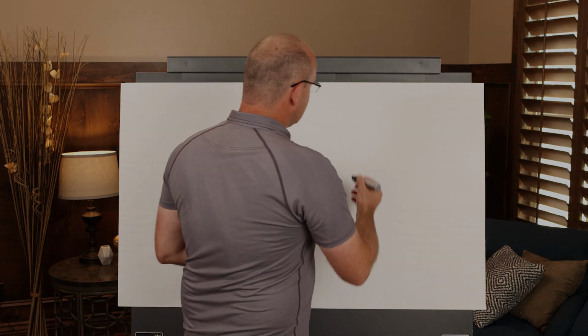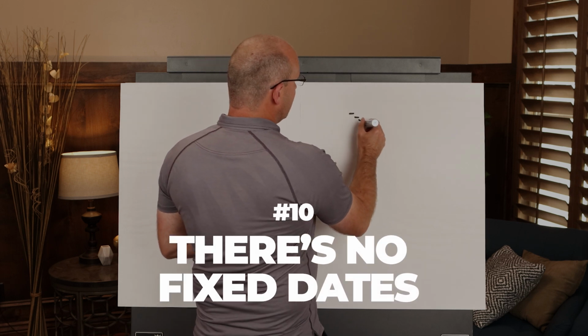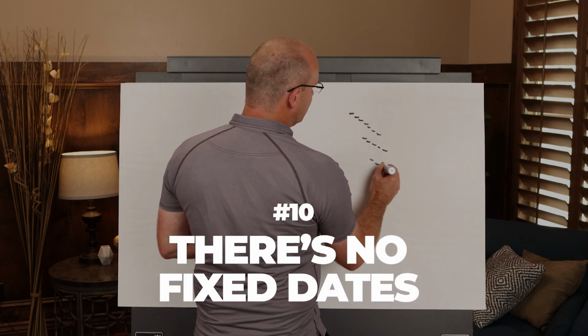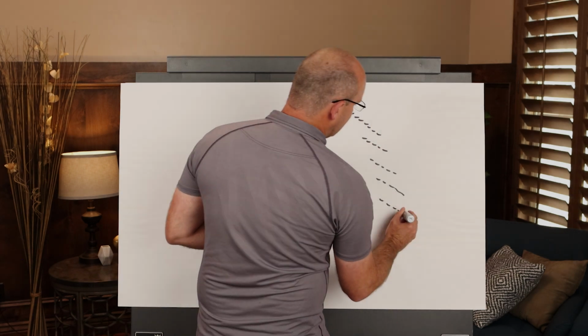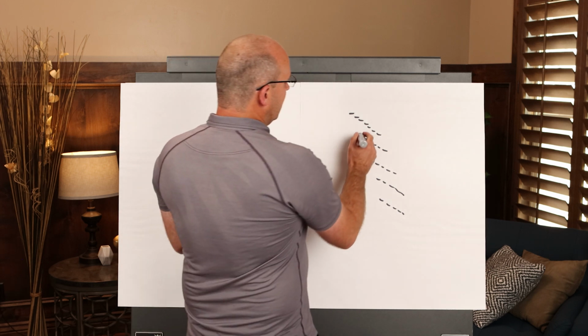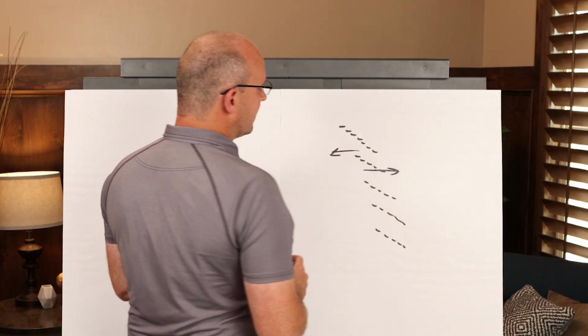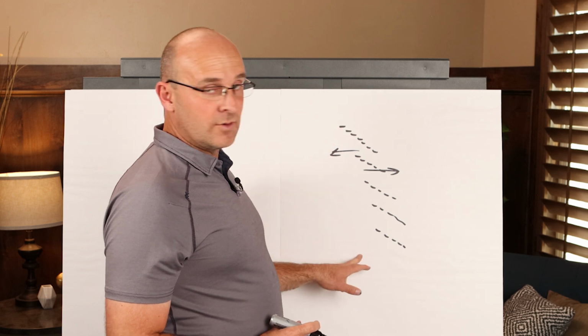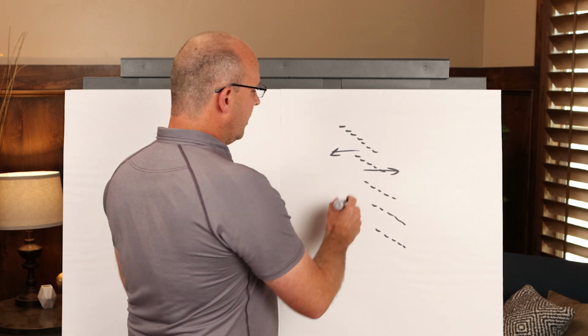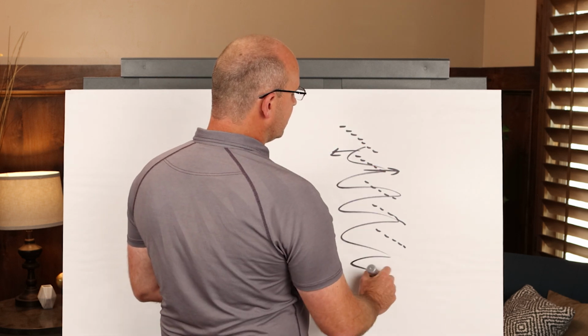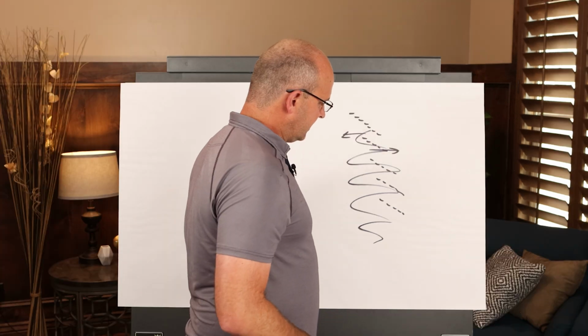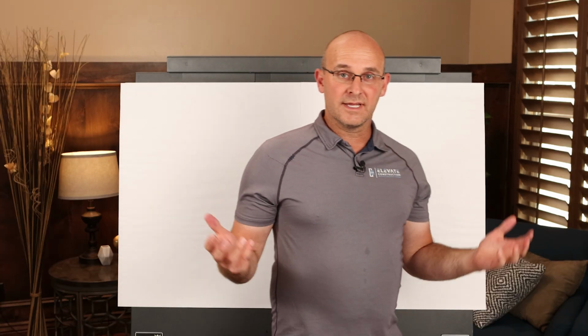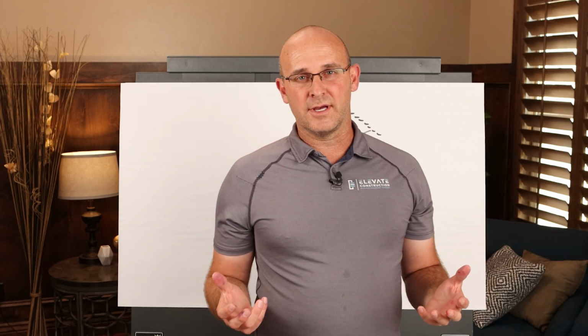And one of the last ones that I want to talk about is that because every week you do not have fixed dates that are coordinated with the trades, it will move forward, it will move back. So the start dates, the production targets, the required on job for materials are always moving back and forth, which creates unevenness, stops and restarts. I am just barely getting started. I could continue talking about this forever.